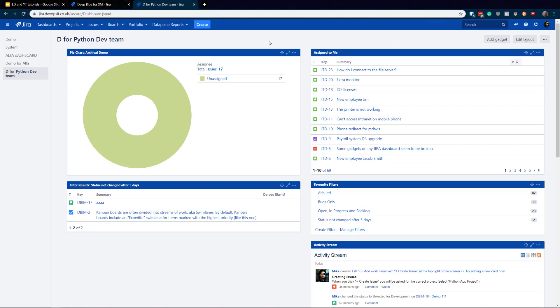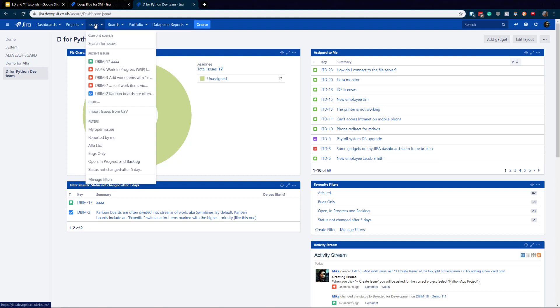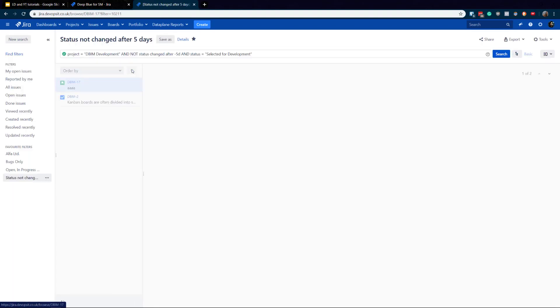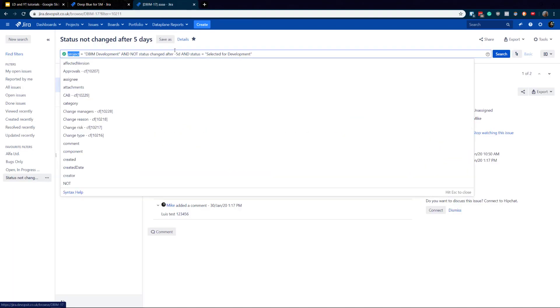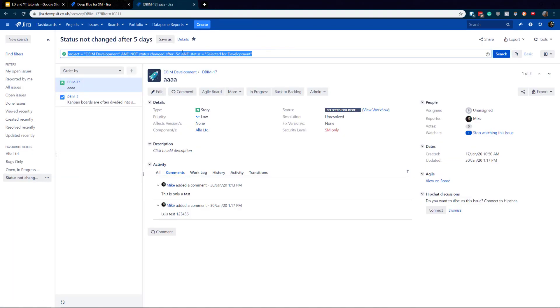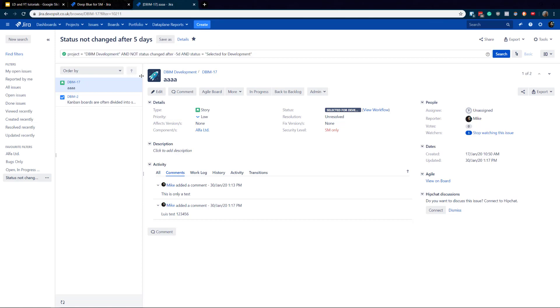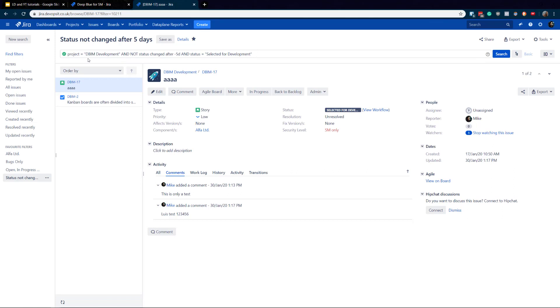Obviously you can experiment with that, you can add some colors, you can change the layout, you can discover this yourself but now I just want to show you one more super cool function which is a little bit hidden in my opinion. If we go to the filters, gadgets are the filters. I've got this I used before, I'm looking for a status which hasn't been changed for more than five days. So this is very important for me as a scrum master so I know those two issues as you can see hasn't been updated for a long time and they are sitting in a select for development status. Obviously it's just for one project, can be added to multiple projects.